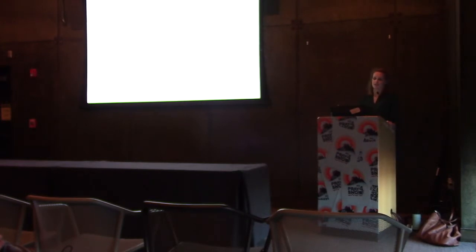And then cross sections, if they are going to apply to your project. You don't necessarily need a cross section for every impact, but try to choose representative cross sections for your project. And again, separate them by impact type, duration, what they're impacting, and then facility is also helpful. So here again, the different colors represent different types of impacts. So that was fill from a roadway, that was fill from a trail, that's cut, and just the different types of facilities that are causing impact.